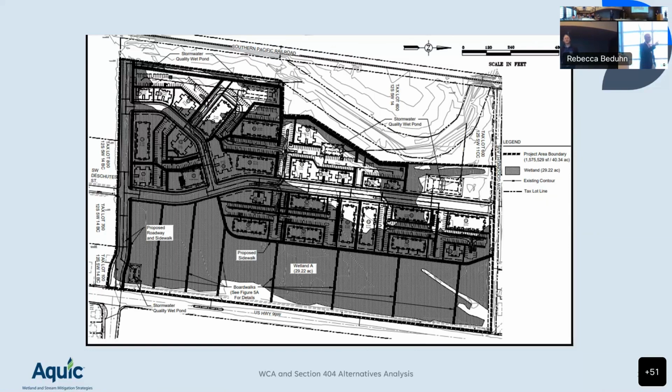You mentioned zoning earlier, and I'm waiting for a spot to ask, has anybody been involved, or any consultant been involved, in helping an applicant get something rezoned or a zoning variance or something to make their project happen? It's not all that uncommon, right? For that reason, something just not being zoned perfectly doesn't always automatically eliminate an alternative, because zoning can be changed all the time, with variances.